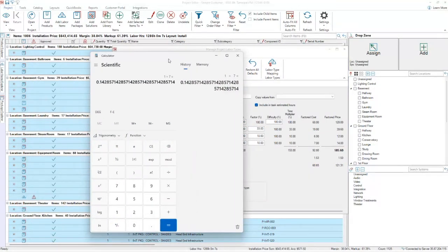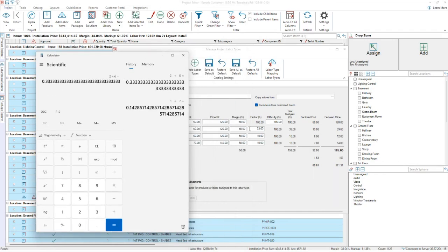If that number changed, say it's 2 hours of non-production time, right? I'm getting 6 hours of production a day, then it's 2 divided by 6. Again, as long as those two numbers add up to my schedule time, this ratio works really well. So notice that the 2 divided by 6 is the 0.33. That's where this number came from.